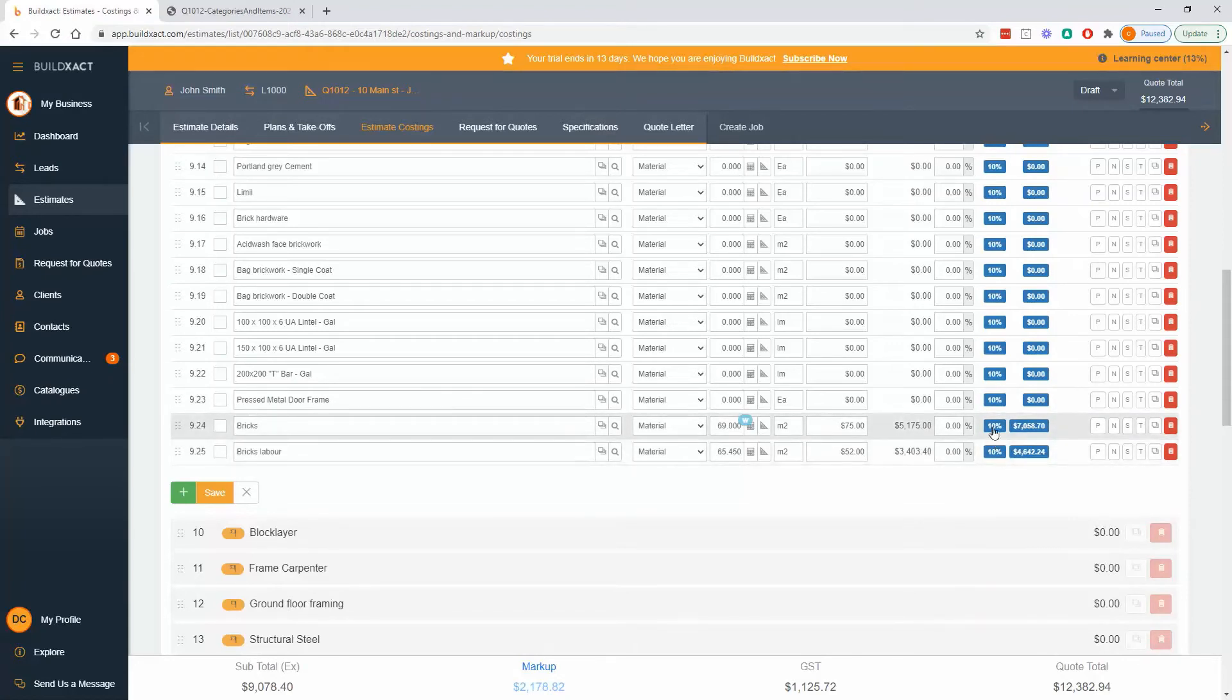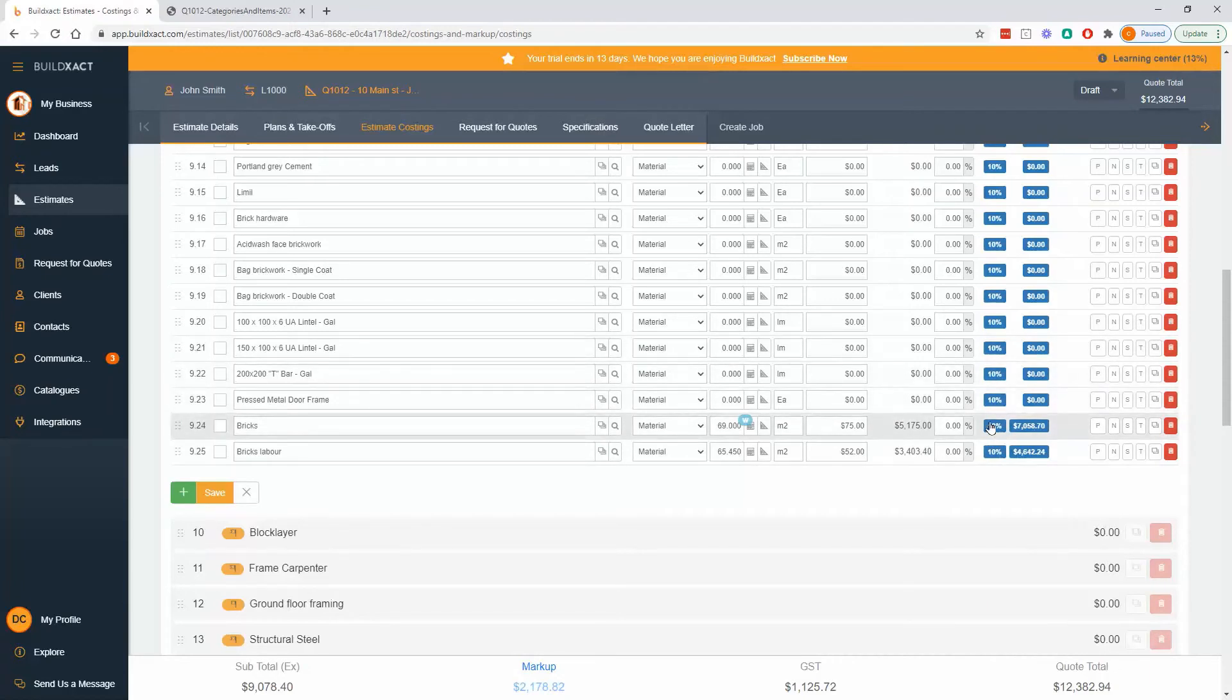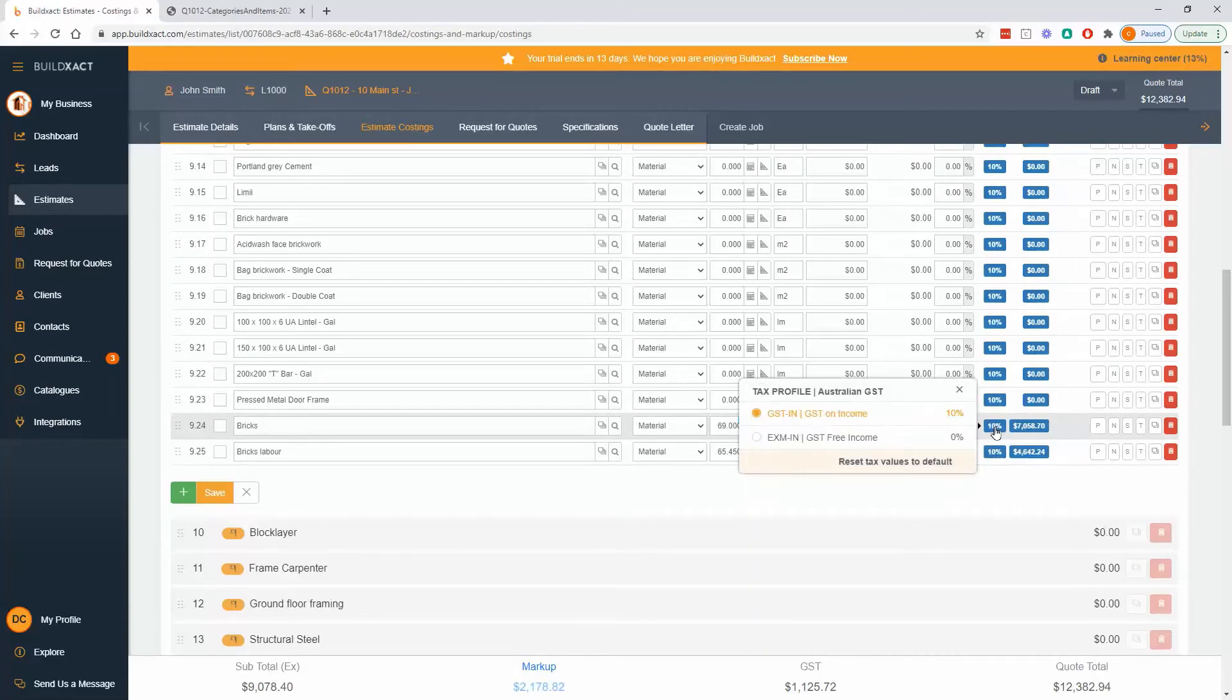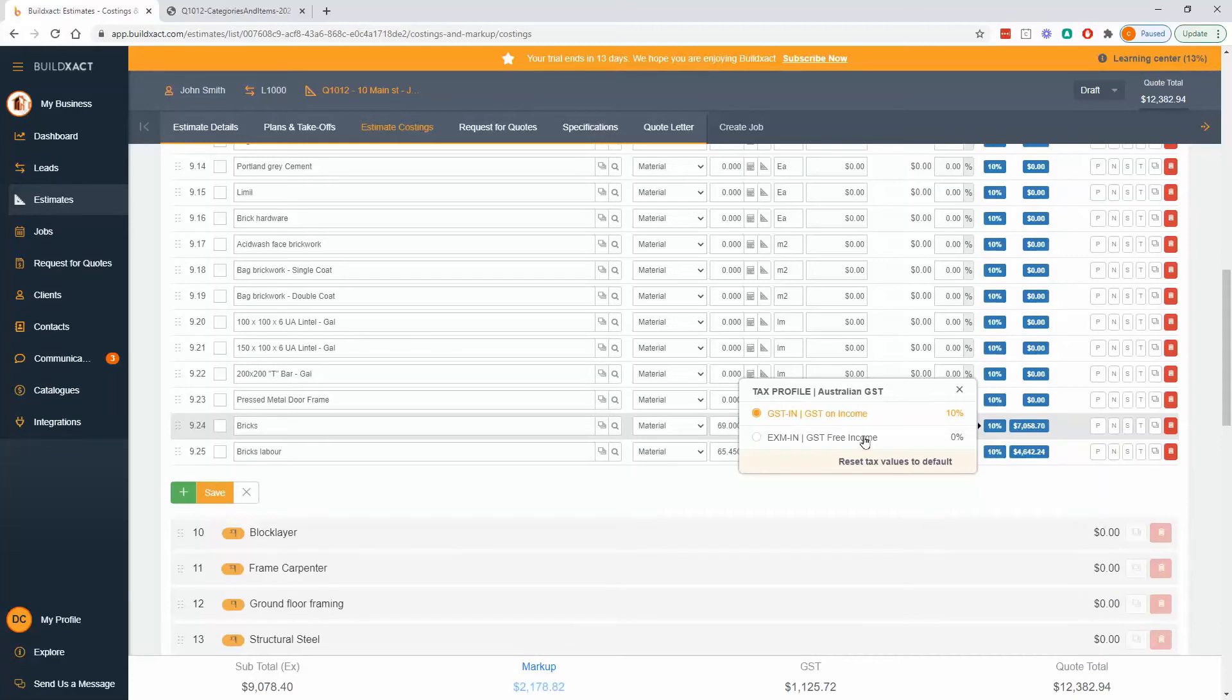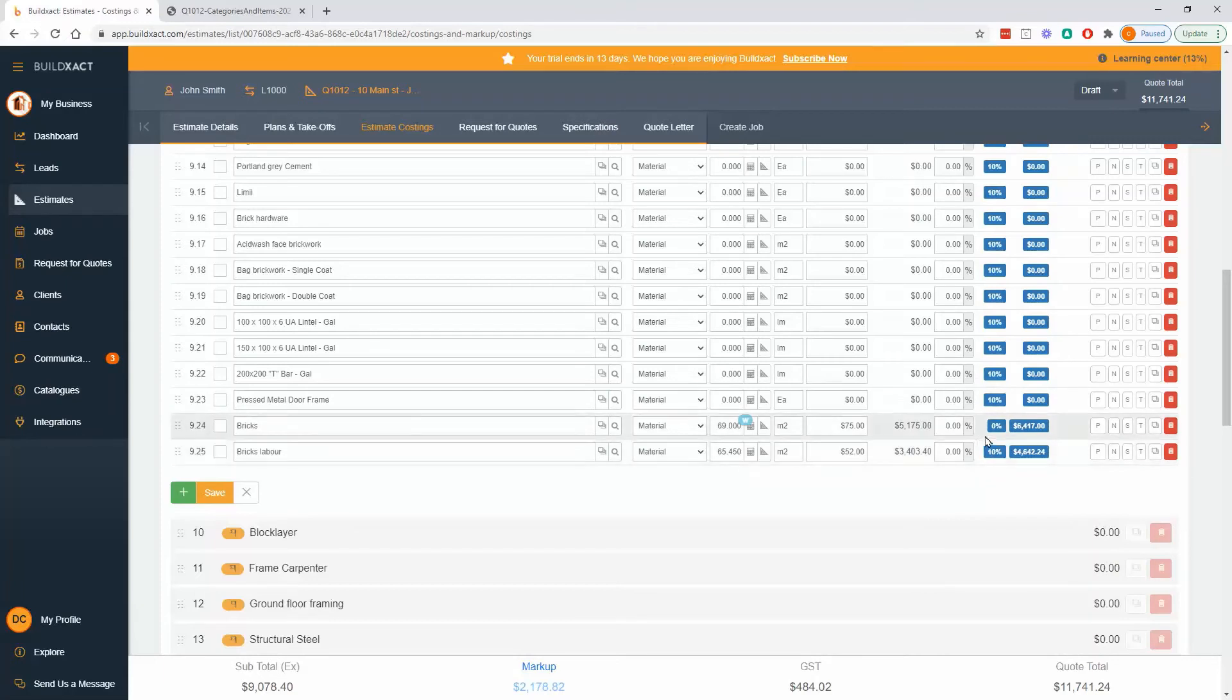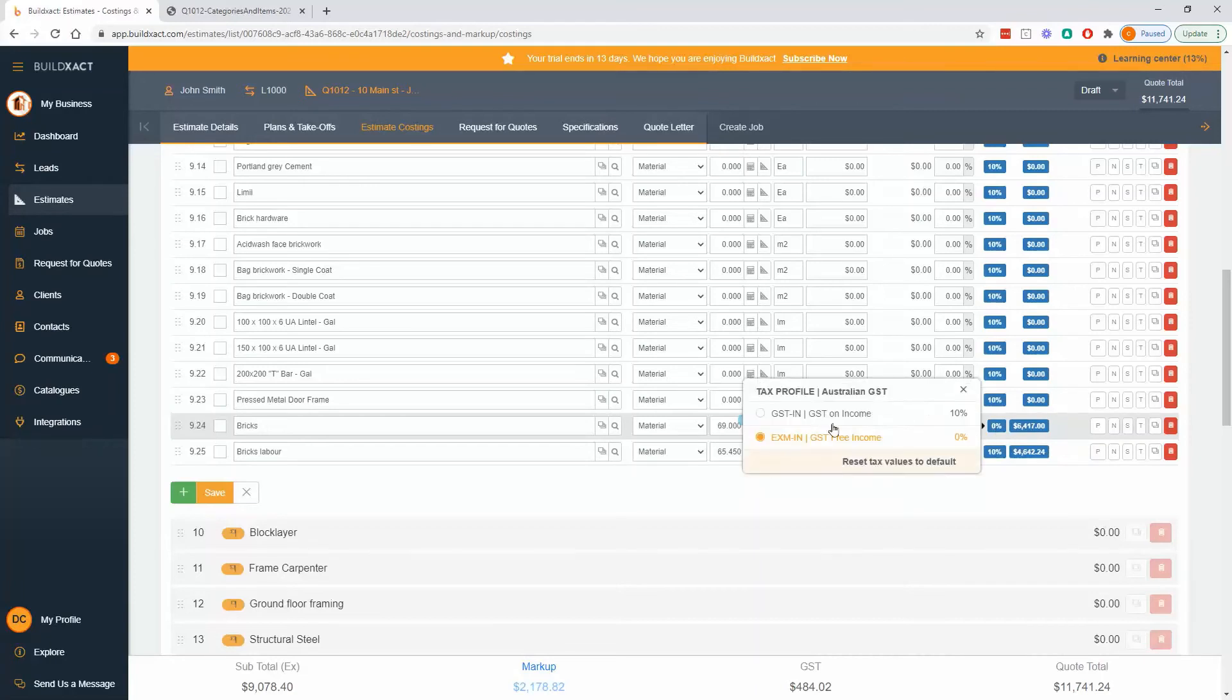So each and every item has a tax percent, you can see 10% for everything. So I've got Australian GST, 10%. I can go into each of them and change it to GST free. So for bricks and brick labor, it's not going to be GST free. But examples might be if you're doing, if you've got a cancel item, or something that does not attract GST, you can simply change it to zero. And all it's doing is for this total, or for this line, it's not calculating any tax.